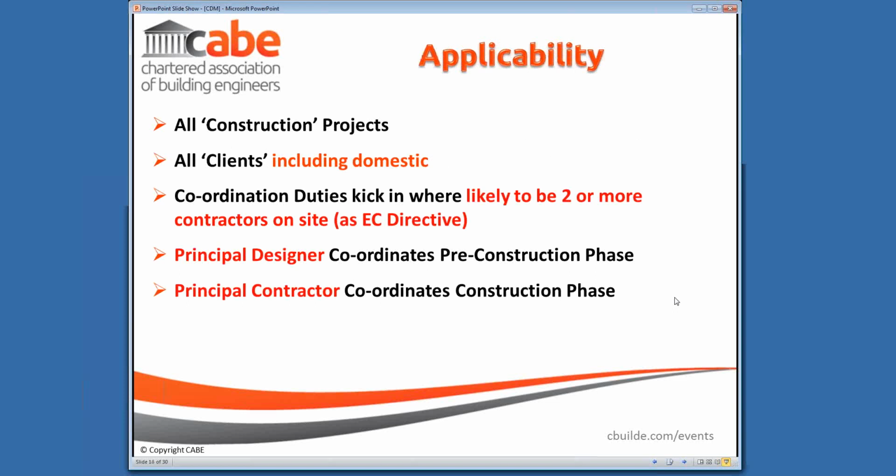But otherwise now we're looking at all projects, anywhere where we've got contractors involved, and a clear distinction between the principal designer having the main role during the pre-construction phase and the principal contractor during the construction phase.